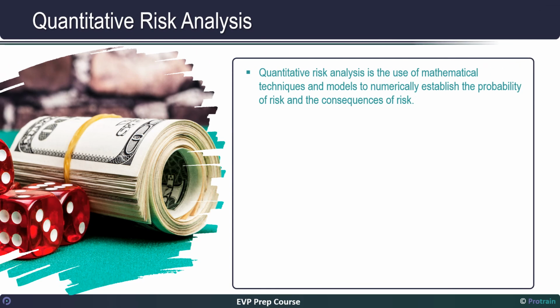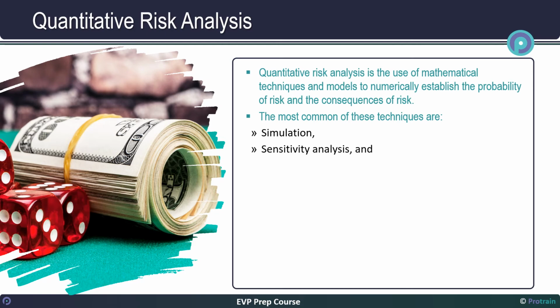Quantitative risk analysis. Quantitative risk analysis is the use of mathematical techniques and models to numerically establish the probability of risk and the consequences of risk. The most common of these techniques are simulation, sensitivity analysis, and decision tree analysis. We shall discuss each method in detail in the next few slides.